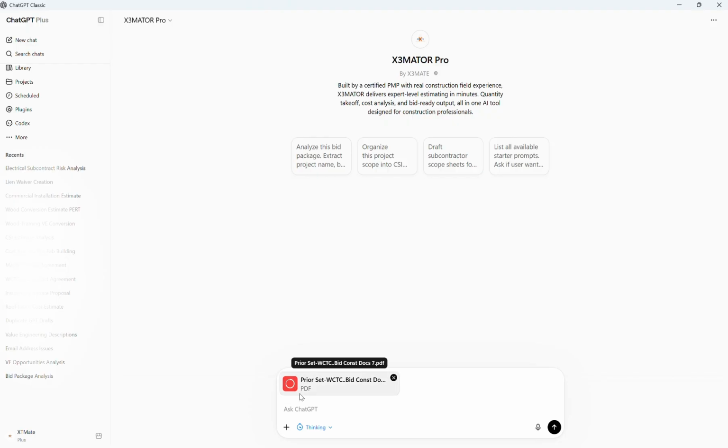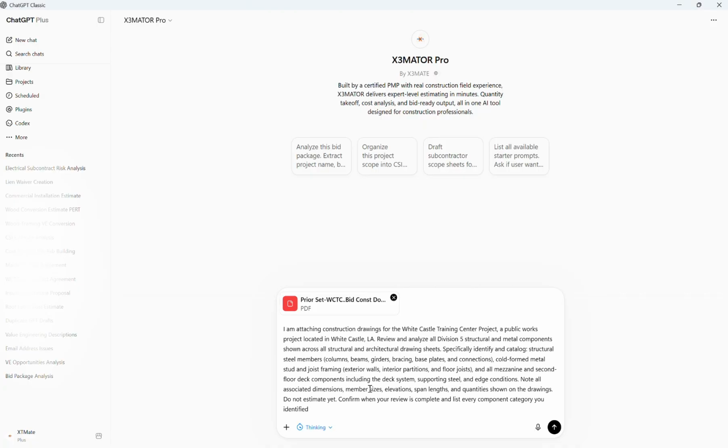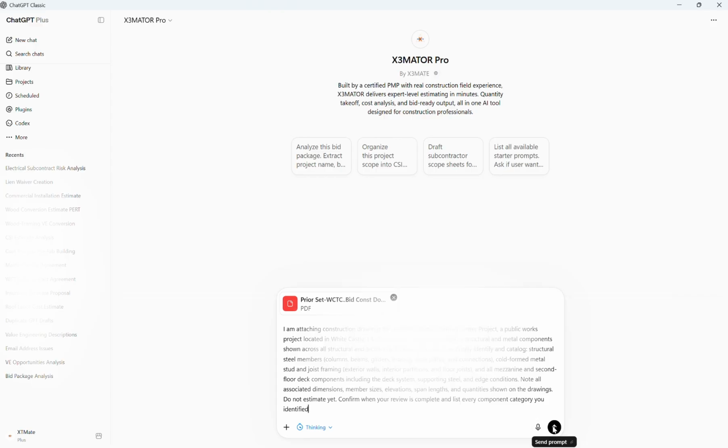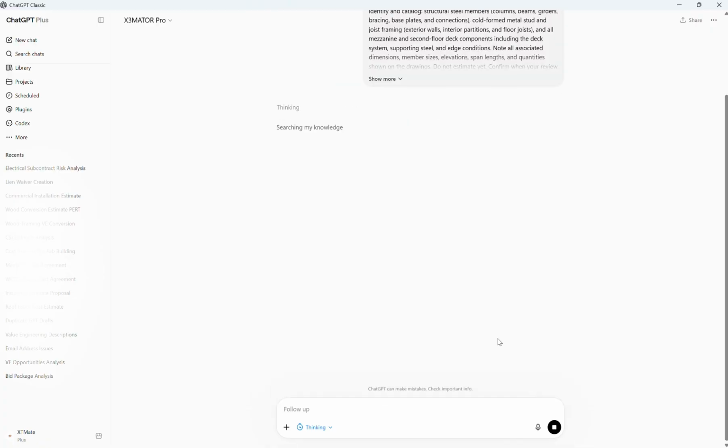The project is underway, and we are nearly done buying out subcontractors and vendors. During the buyout, we made an ugly discovery. Our cost for the steel structure has jumped roughly 13.5% since public bidding was held. And it's not all about price. Steel suppliers are getting buried in demand from data center construction. Lead times are stretching and availability is tight.